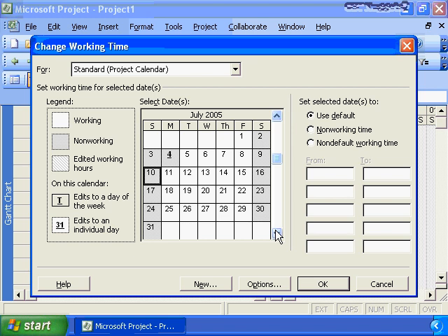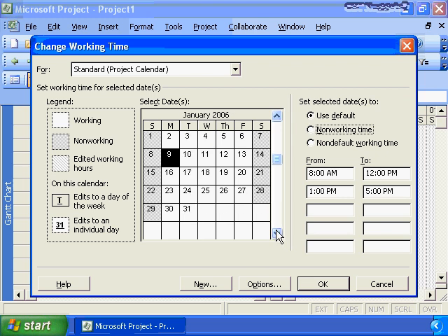Microsoft Project does not by default set any statutory holidays. So we will go on and find our next statutory holiday, Labor Day, and we will set it as a non-working day. And we would continue to do Thanksgiving Day and Christmas and New Year's Day and the appropriate holidays that your organization will observe. While you're setting holidays, I would encourage you to go in and set the holidays for several years in advance. You may be planning a project that's only 6 months long, so you feel you're safe only setting the holidays for the next 6 months.